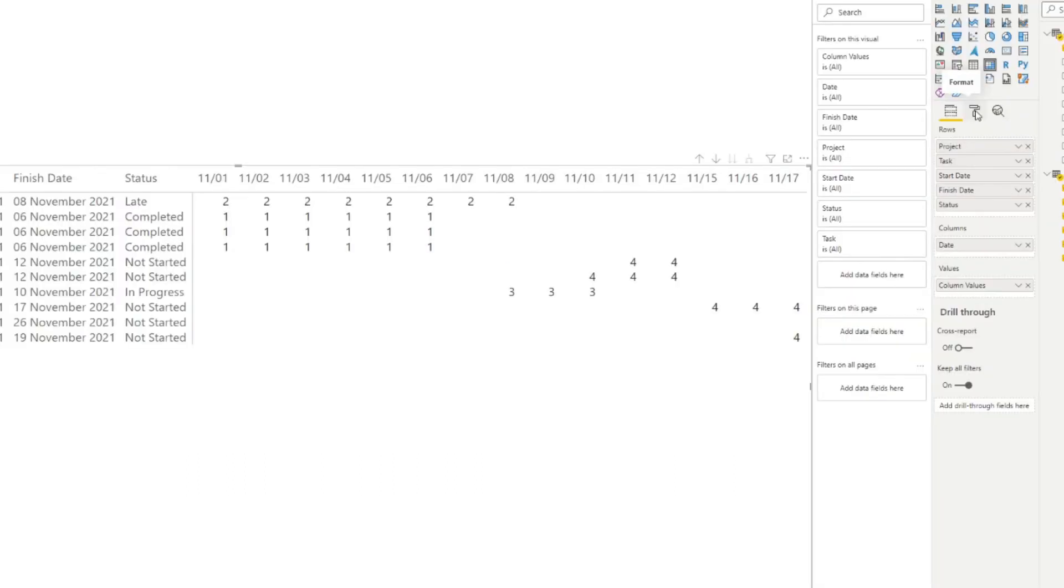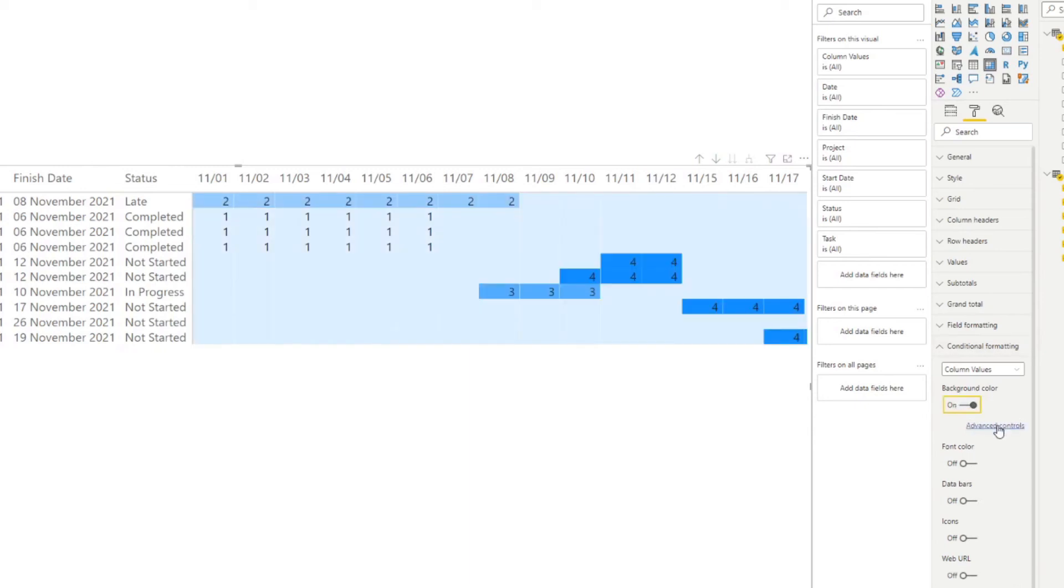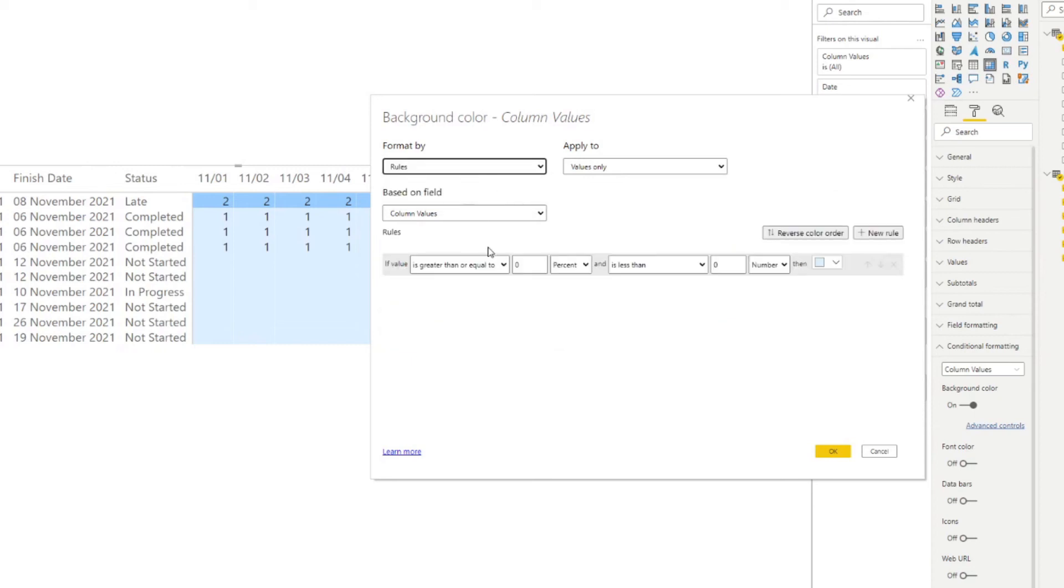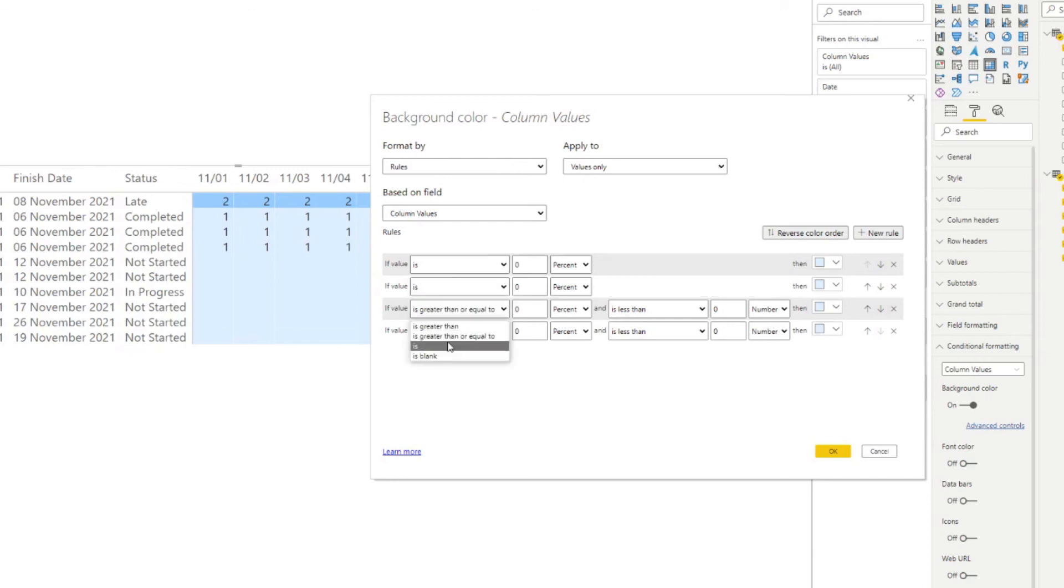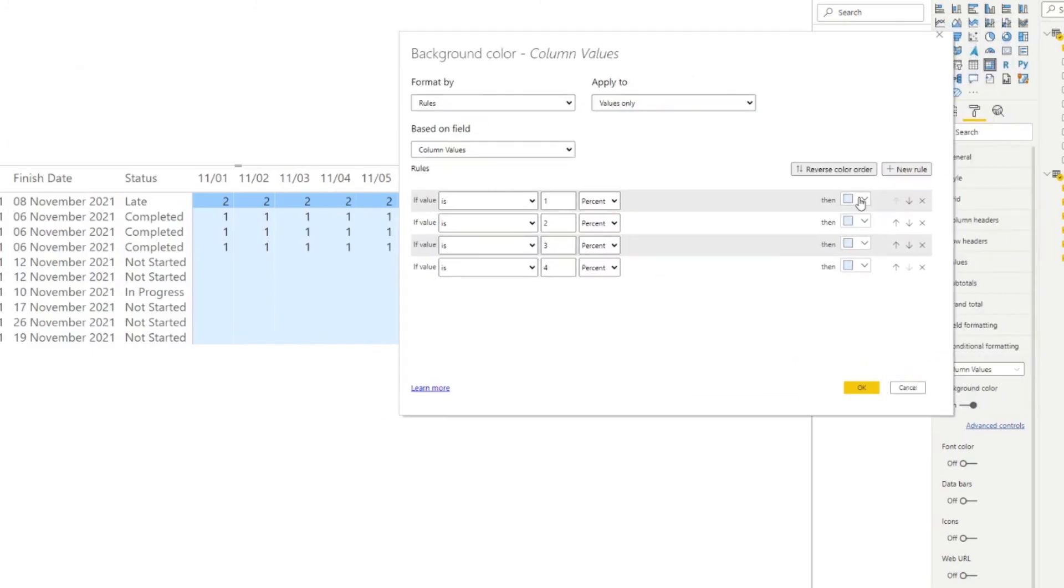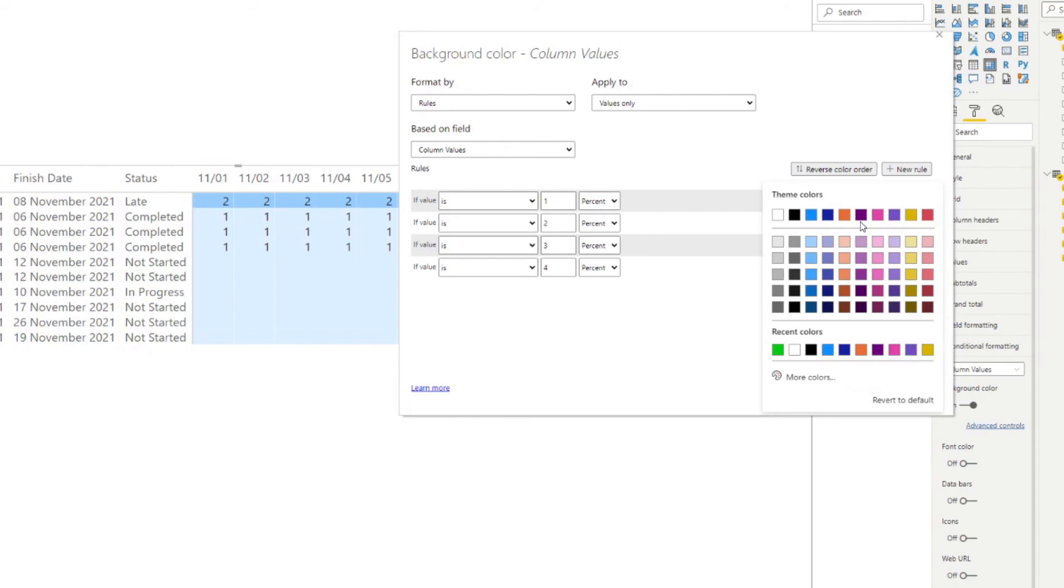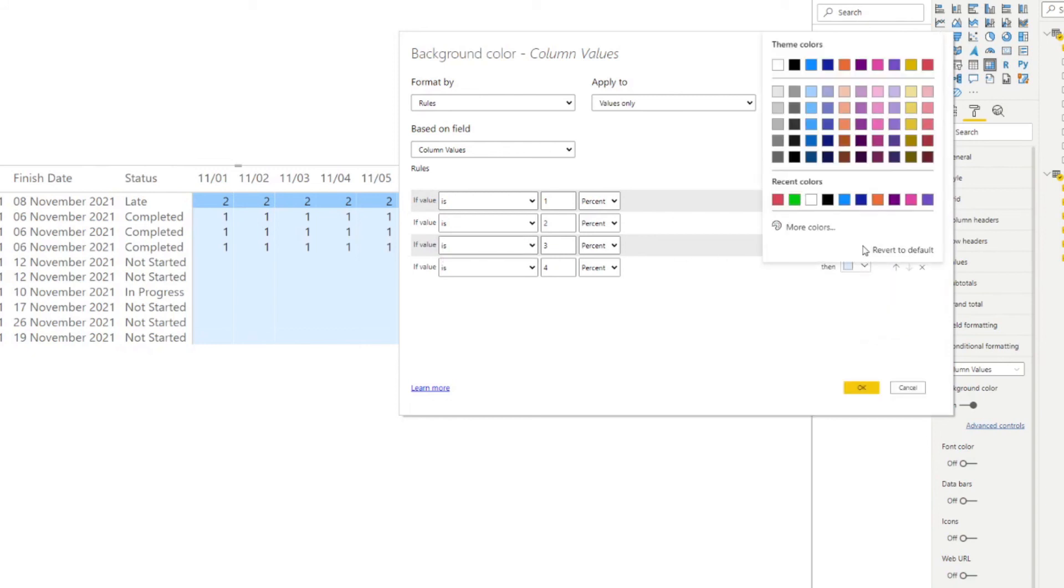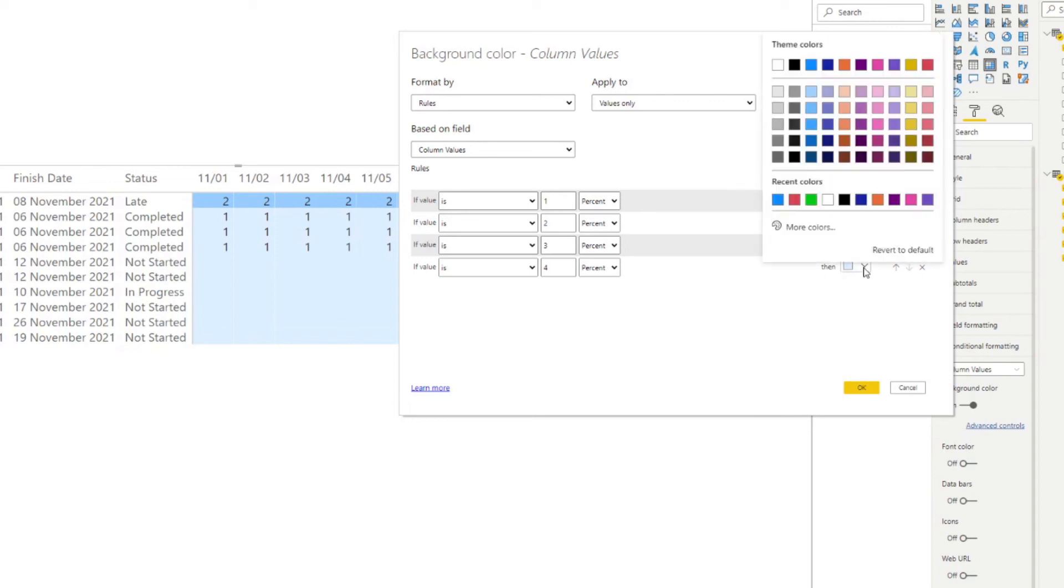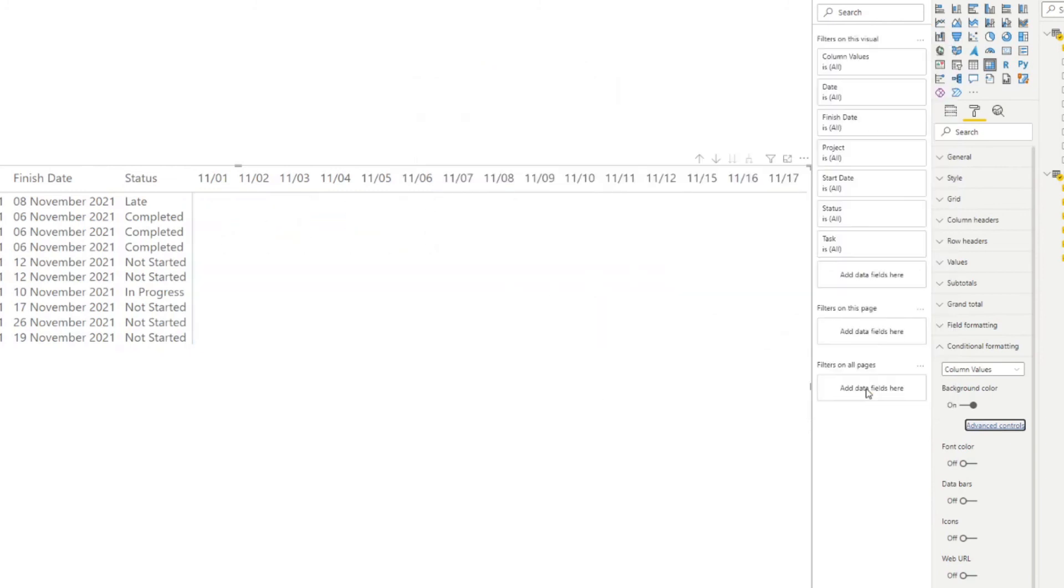So to do that, we're going to go to the format pane over here, we go to conditional formatting. And we're going to first just try to change the background color. So if it advanced here, we're going to define the color based on certain rules. So we'll say, we're going to create four. And this corresponds to the numbers that we've put in there. So if we want is is value, so if it's completed, late in progress, and I don't remember what this one is for is not started. So one is completed, so it should be green. So we'll just pick a random green color here, it doesn't matter. For two, it should be late. So it's red in progress, we can mark it as blue. And then not started, we will just mark it as gray for now. So if we hit OK.